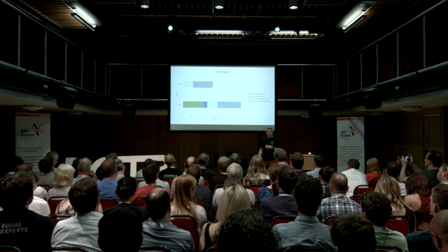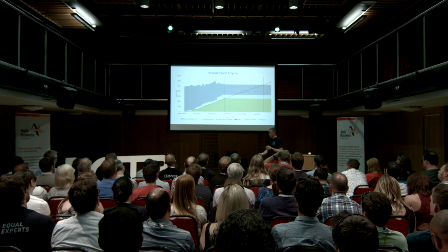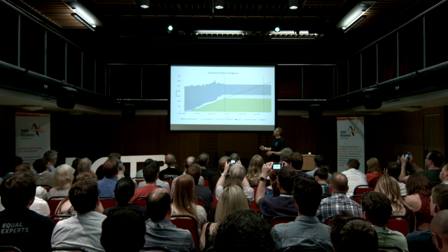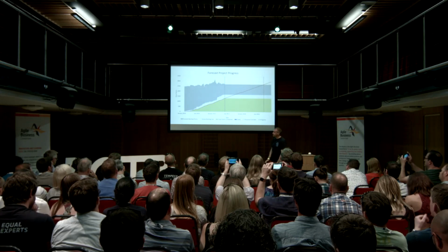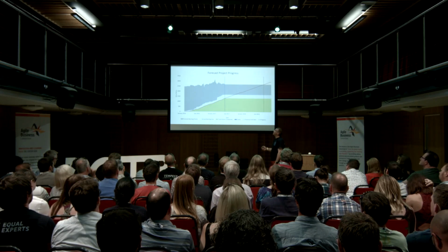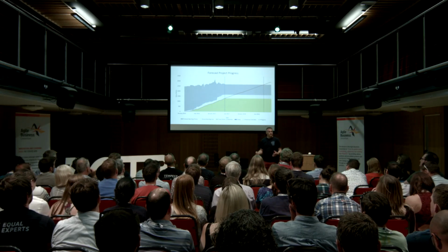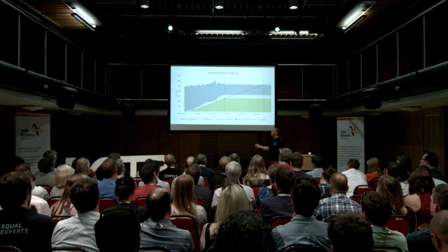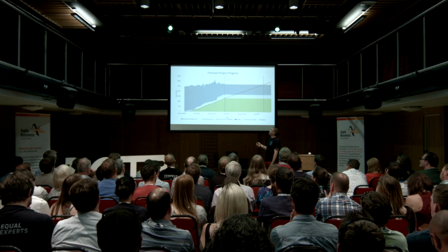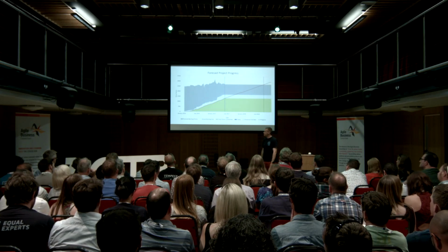The other way that this is useful, if you use the burn chart that we looked at earlier, you can use something like this. So again, green is done. Here the red line is our forecast velocity. And the silver part is the total work that we've got estimated in the backlog. And the dark grey is work that we're forecasting. So you see at the start of the project, we've got a whole bunch of work that's forecast and nothing's really been estimated. And as we get closer, we're obviously completing work and more things are being estimated.